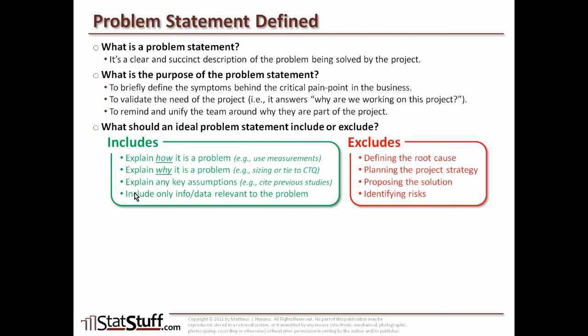There are several things we want to make sure we exclude from every problem statement. First, defining the root cause. The whole point of doing a Lean or Six Sigma project is because we don't know the root cause yet. If we know the root cause at the time of writing the problem statement, we probably don't even need to do the define and measure phase — we can jump right to analysis. So keep an open mind and make sure the root cause is not identified or assumed within the problem statement itself.